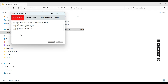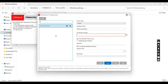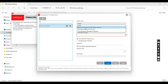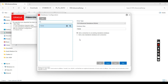Once you come to the next screen, check the Run Database Configuration option — you don't need to check any other option. You will then have the database setup screen for Primavera P6. Currently it is blank with no database configured, so click Add. In the driver type, select the last option: P6 Professional Standalone SQLite. Give the database a name or alias — let's call it PMDB, which stands for Project Management Database. Then select the second option: Add a new standalone database and connection.